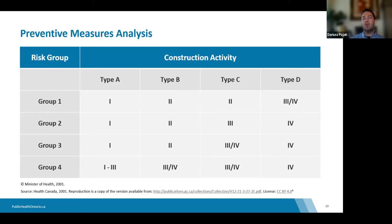You simply identify the population at risk and the work involved, go to the table, and you can easily see what measures are required. Recalling that the long-term care population falls under the geriatrics risk category group, the majority of activities under group three fall under higher PM measures — levels two, three, and four — so most activities do require quite a few measures to be carried out safely.